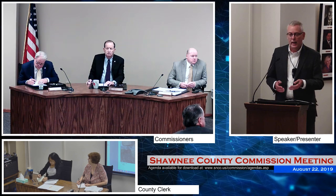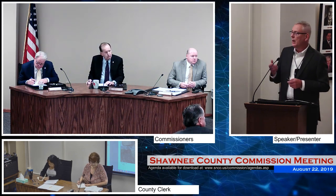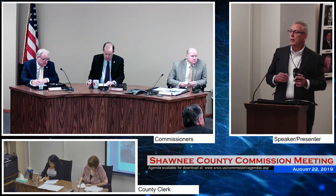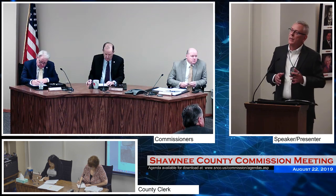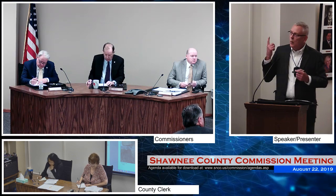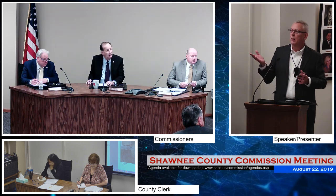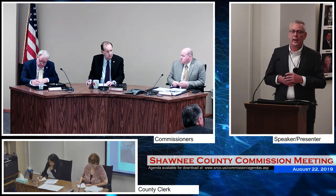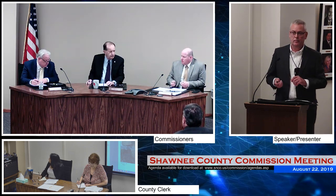And I think that's one reason why our prices from Finney and Turnipseed were so favorable. They understood that probably from a design standpoint, the 2 structures would be very similar. They would probably be the same size. The only difference would be the wing wall configuration. And from a construction engineering standpoint, we're probably not going to let both roads be closed at the same time. That wouldn't be favorable from a detour standpoint. So one person could probably inspect both structures, and I think that gives you an idea of what we've got planned ahead. Any questions? Questions for Kurt?